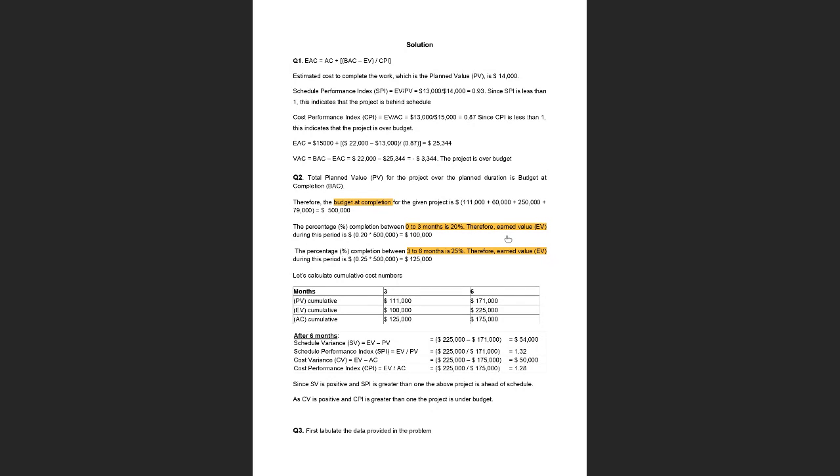Because BSc is right. Thanks, Victor. That is what I have been trying to say here, Jin. So the budget at completion is given to you. Your percentage completion for the first 3 months is given to you. So why do you want to complicate things? You can just multiply this with this.